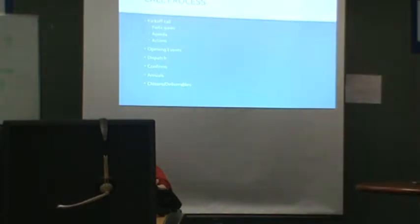Deliverables required, yes or no? Almost everything we do has some sort of deliverable. A deliverable means something we have to send back to the customer to verify completion of work: a signed document, a picture, a sign-off sheet, serial numbers, asset tags. Whatever we have to supply back to them. Again, if we say yes there, but in the SOW it doesn't say anything about the deliverable, that's a change order.